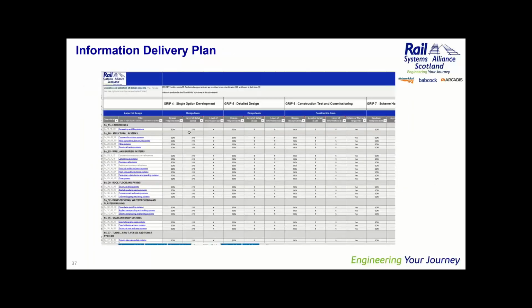The information delivery plan I mentioned earlier on is the document that has changed name over the period of time, and we introduced this version of the information delivery plan on the Alliance. Interestingly, we find it is more valuable on larger IUT projects, enhancement style projects, rather than the delivery of our domestic projects. I think because of the fast-paced delivery of the domestic projects, the introduction of something like this wasn't of great value. The enhancement projects, it certainly was.